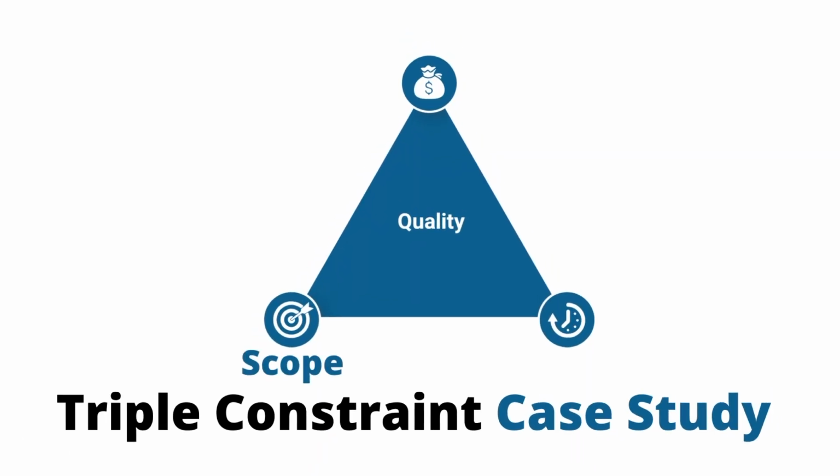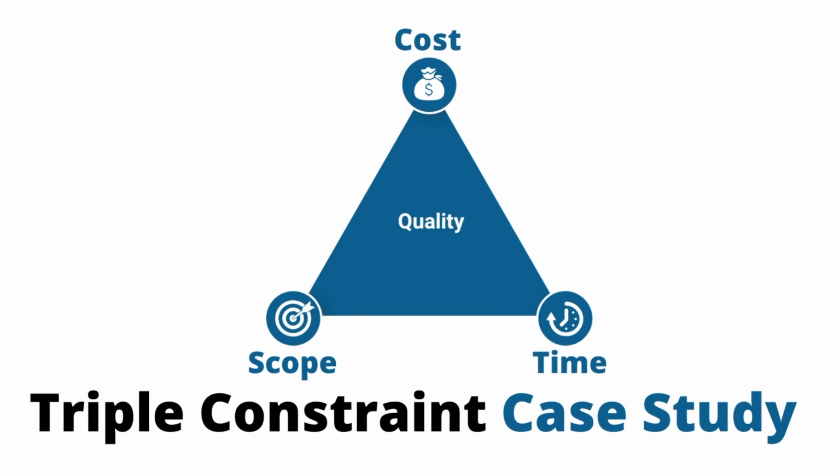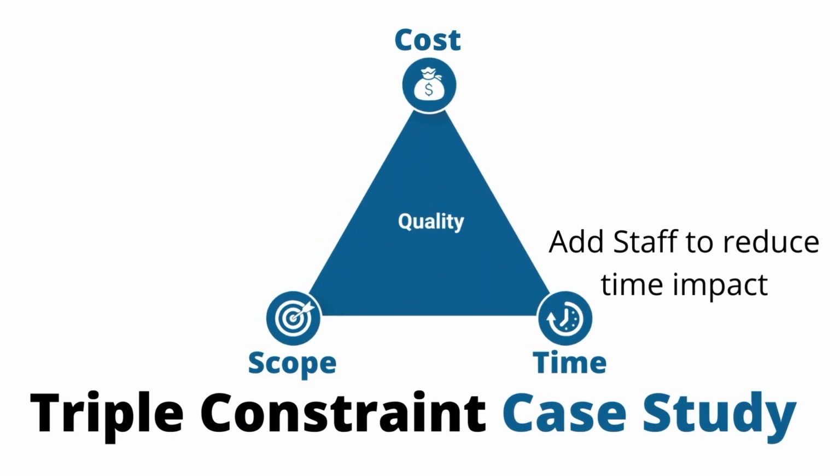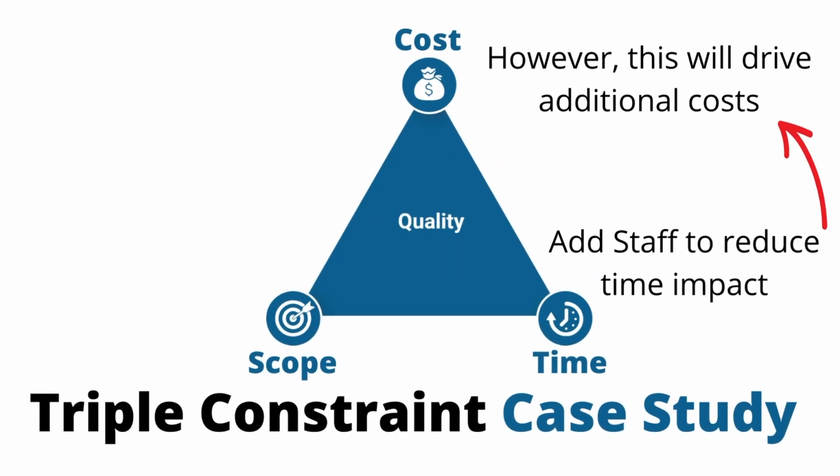However, in recent years, this triple constraint theory has been assessed as maybe being oversimplified. So we're going to look at a few more in a minute. But first, let's talk about triple constraint as a case study. Total calendar time is fixed, but scope increases. What kinds of things can a project manager do to keep the project on track? You might try one of the following things. A, you might add staff to increase the amount of effort you can put in toward that change.